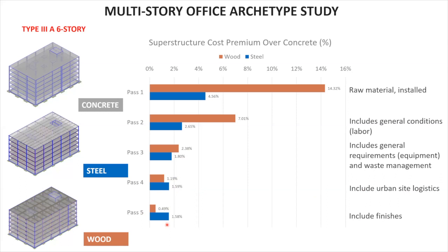So the moral of this story is, if you want an accurate cost of what a mass timber system is, and time is money, you need to include the time in the estimate.